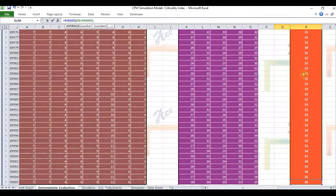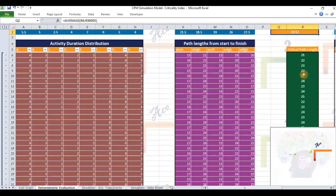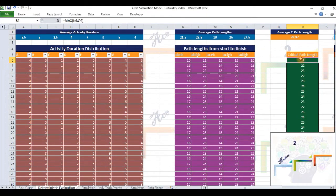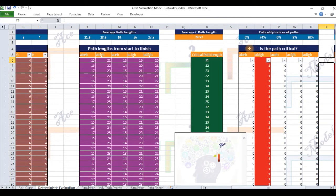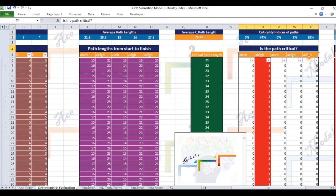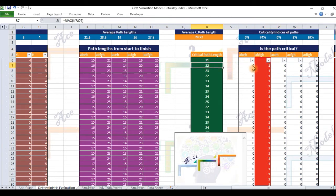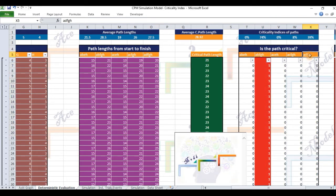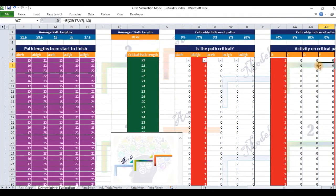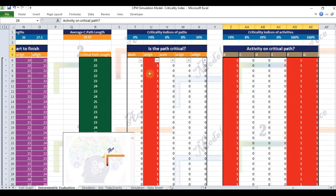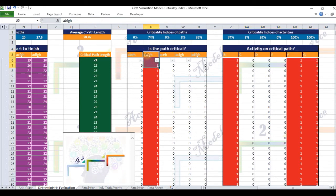Having determined the length of the critical path, the model goes on to identify the critical path among the paths A, B, E, H; A, B, F, G, H; A, C, E, H; A, C, F, G, H; and A, D, F, G, H. The identified critical path is highlighted in red. Having determined the critical path, the model goes on to identify activities that lie on the identified critical path. The cells corresponding to these activities are highlighted in red. The model then computes the criticality indices of these activities in row 2, columns Z through AE, and the criticality indices of these paths in row 2, columns T through X.